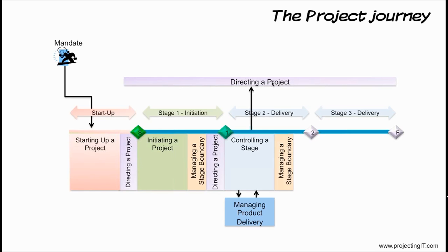The end stage report will help the board decide what to do next with the project and how the project is progressing. If any benefits have been achieved, these are also reported using the end stage report. The project manager will review the BID to see how the strategies and controls are working and if they need to be updated. If any people are not required or resources can be released, the project manager will release them and will update the organization structure.